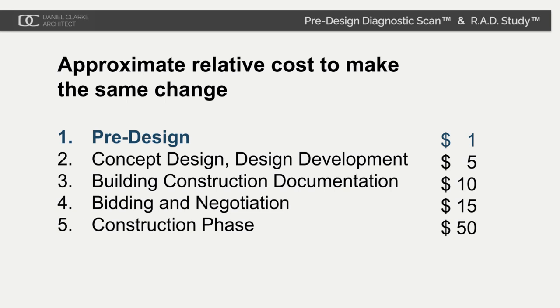During concept design, maybe five dollars. Construction technical documentation, ten dollars. Bidding and negotiation, fifteen dollars. By the time you're in construction, it'll cost you fifty dollars — fifty times as much to make the same change.